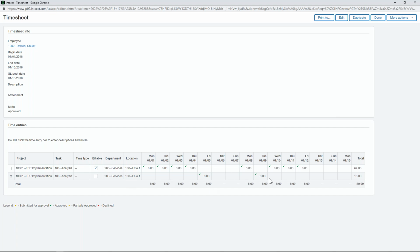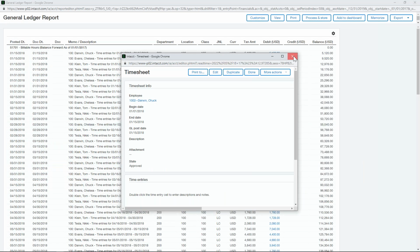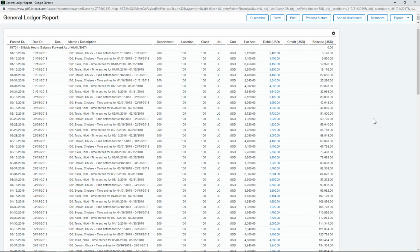It's still utilization, it still goes into utilization rates across all of my consultants, but it's not billable to the customer. Now, either that was determined by me, the project manager, or it was determined ahead of time. We agreed to, let's say, a maximum of hours that we bill a customer, or it's just something that we did for goodwill purposes, right? As project manager, which I've played in the past, it happened a lot where we had to give some goodwill. So, I would give up a couple of hours as goodwill, maybe because we're nearing the top end of what we agreed to for billing terms.